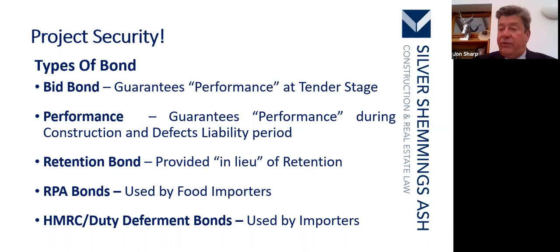There are also performance bonds, which guarantee performance during the construction period and the defects liability period. So, you've said in your tender documentation you're going to do this, fine. During the actual construction progress, you get a performance bond which makes sure that you do. You can get a retention bond, which can be provided in lieu of retention.